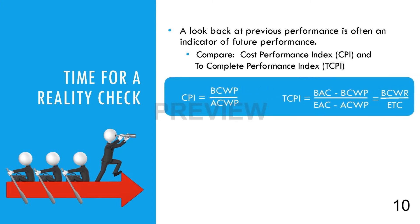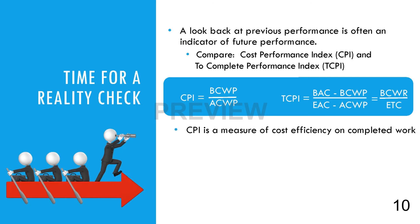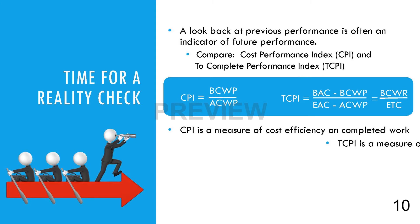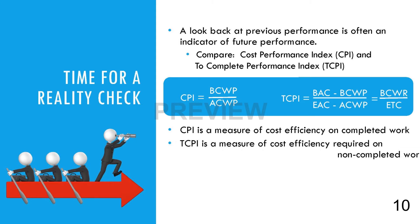The formula for reviewing the past uses the CPI, which is determined by dividing the BCWP by the ACWP. The formula for the TCPI uses the BCWR as the numerator and the ETC as the denominator, predicting future performance. The CPI is a measure of cost efficiency on completed work, while the TCPI is a measure of cost efficiency required on non-completed work in order to achieve the EAC.